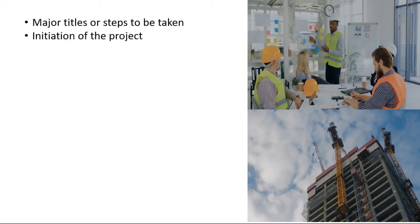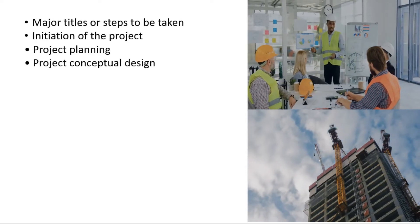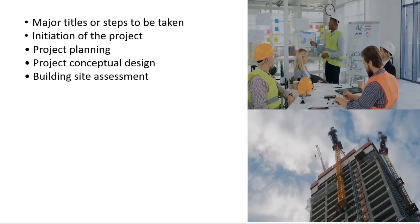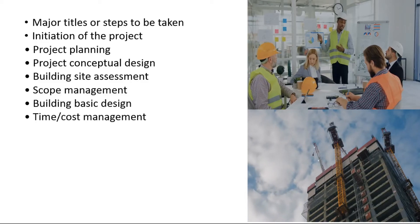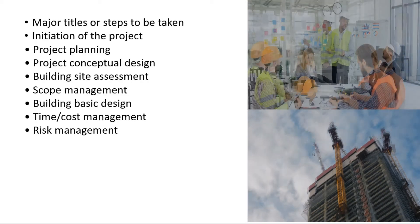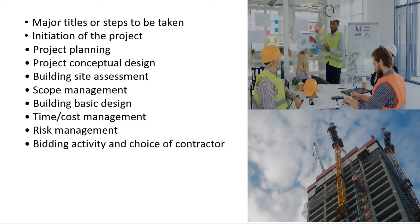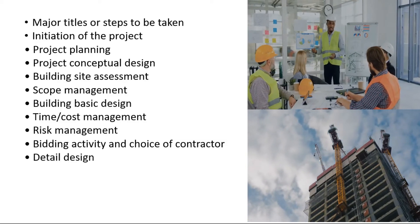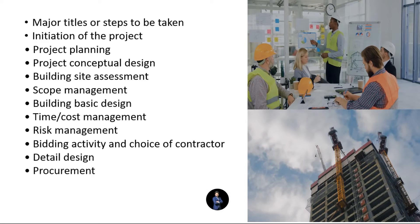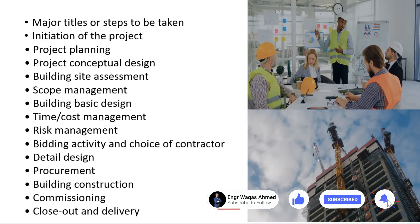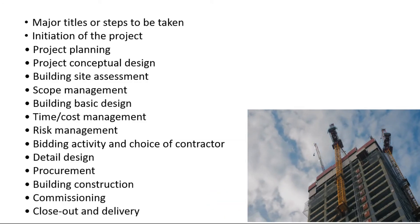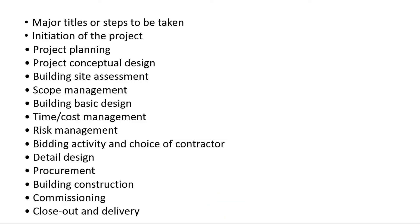The major steps to be taken are: Initiation of the Project, Project Planning, Project Conceptual Design, Building Site Assessment, Scope Management, Building Basic Design, Time and Cost Management, Risk Management, Bidding Activity and Choice of Contractor, Detail Design, Procurement, Building Construction, Commissioning, Closeout and Delivery. We are now going to have a step-by-step breakdown with details of each given WBS element.